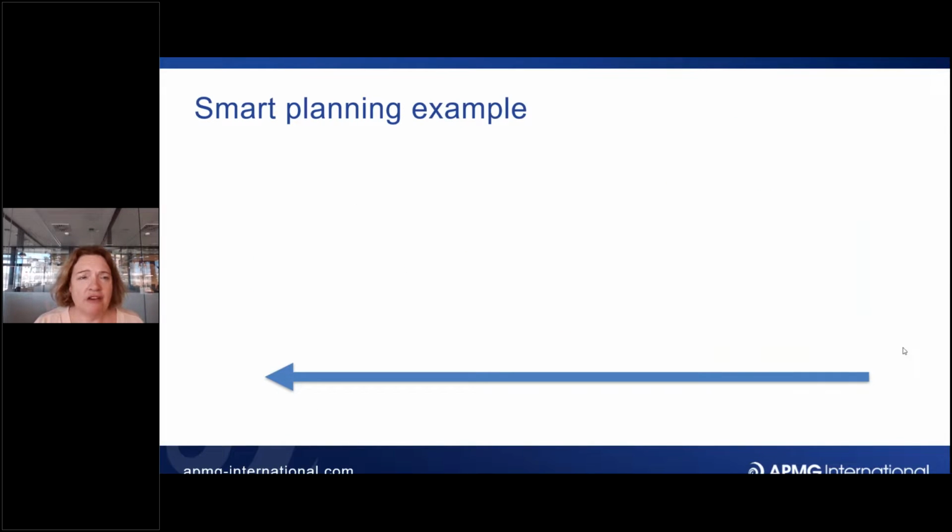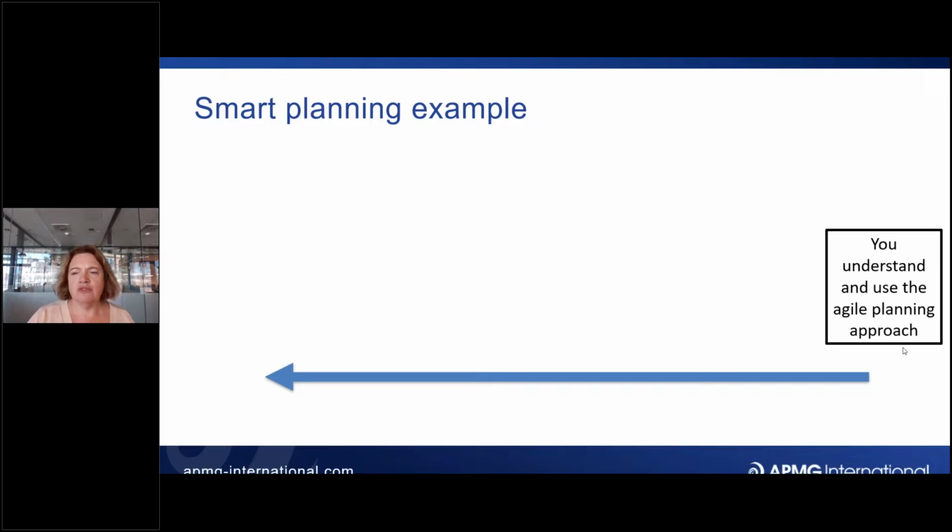And I'm just going to give you a very quick example because we're on this webinar. So of course, I'm going to use the webinar as an example. I know it's a tiny thing, but the secret to agile planning is being able to decompose any piece of work, anything, by asking yourself, no, I'm not going to focus on the work, but what's the result of the work? Because as soon as you ask yourself what's the result of the work, you get the end goal.